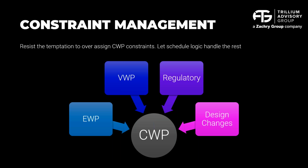And when we're faced with some of these smaller schedules and smaller SAS, I'm floating the idea here, and maybe it strikes some thought for the audience, that we use fewer and larger CWPs/EWPs so that when a package of work comes, there's more confidence that you're going to get everything you need at that time, versus newer engineers, newer groups getting lost in hundreds of EWPs that actually could be duplicates in some cases. They shouldn't be, but they may have a tendency to put some of the specification type documents in there rather than focusing on the work or the information that's needed for the constructor. So again, I'm floating the idea of really spending that time during the schedule development phase and the CWA, CWP scoping to see what makes sense for the constructor, the team that's going to build it. And that should help you limit over-expending time on package development.